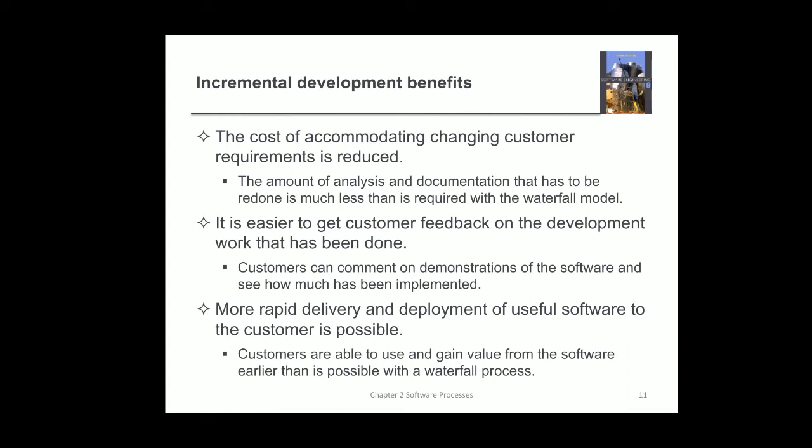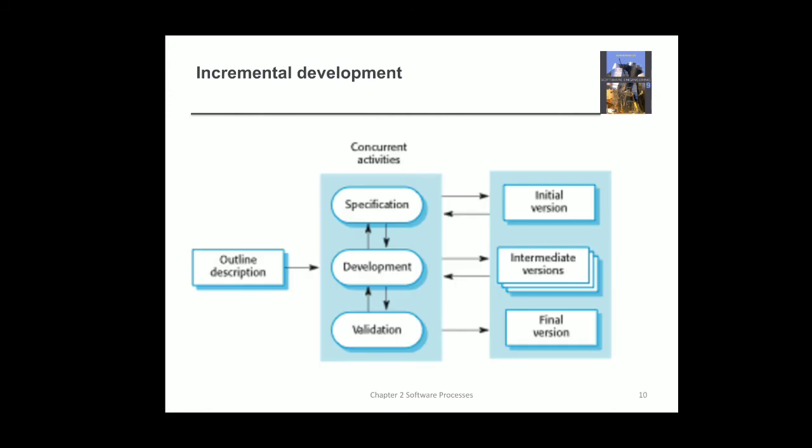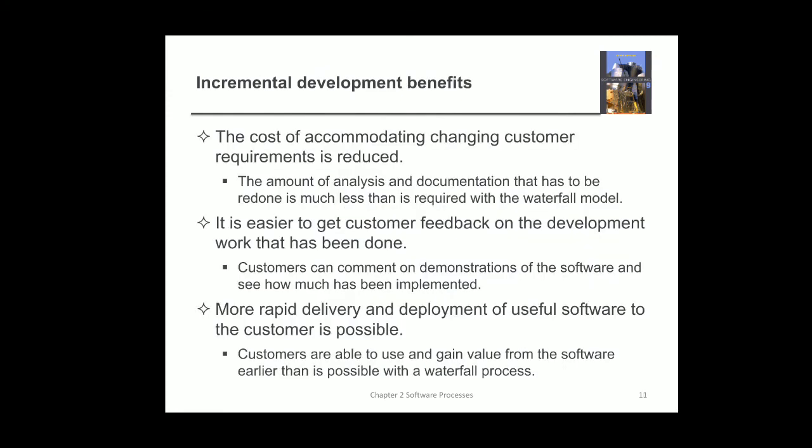The second one is that it is easier to get customer feedback on the development work that has been done. You have seen in the previous slide that once a part of a functionality is developed, it is given as the initial version to the customer. The customer will be using that and coming up with suggestions for the product that will be developed later. But in the waterfall model, the customer will be getting a product only at the last.